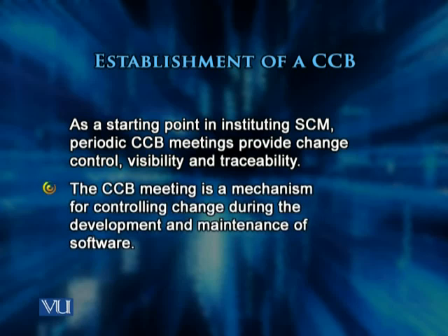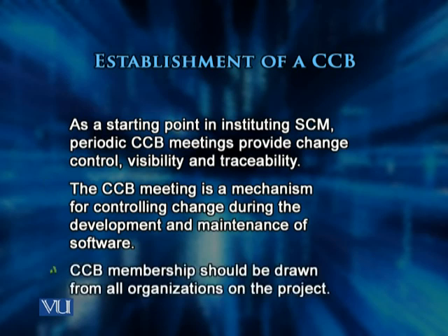The CCB meeting is a mechanism for controlling change during the development as well as in the maintenance activities of the software product. CCB membership should be drawn from all organizations within the project. And we had talked about this, and there is no need to repeat all the groups that can have representation on the CCB.